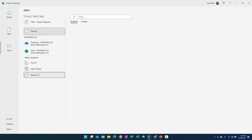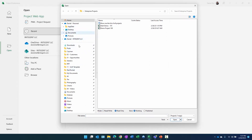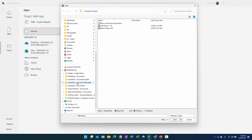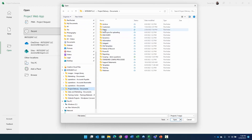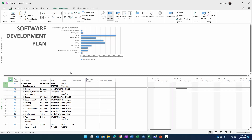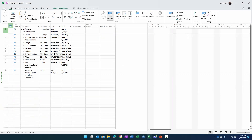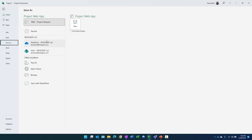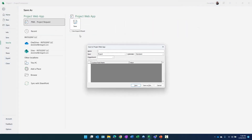I'm going to browse to where my project templates are, located in my delivery demo project templates folder. We're going to open the IT template and save it as a template. We select File > Save As, click Save, and call it 'Information Technology v1' with a type of Template, then click Save.